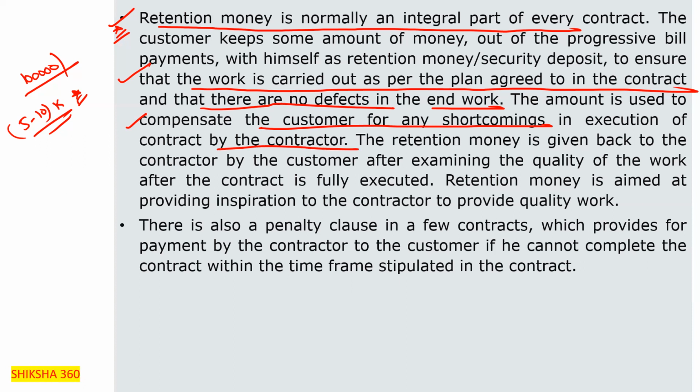The retention money is given back to the contractor by the customer after examining the quality of the work, after the contract is fully executed or the work is completed here. Retention money is aimed at providing inspiration to the contractor to provide quality work here.